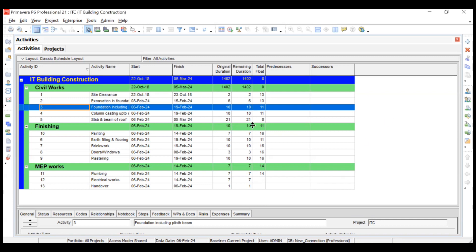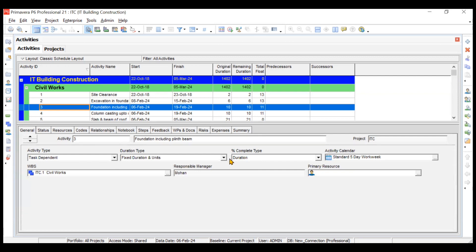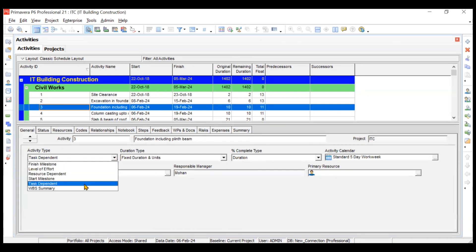To explore this, I'll open the detailed view. Starting with activity type — you can see there are several types. The first is start milestone. Milestones are just achievements; they do not consume any duration. For example, 'starting of the foundation' would be a start milestone with zero number of days — it simply marks the start of a certain activity.